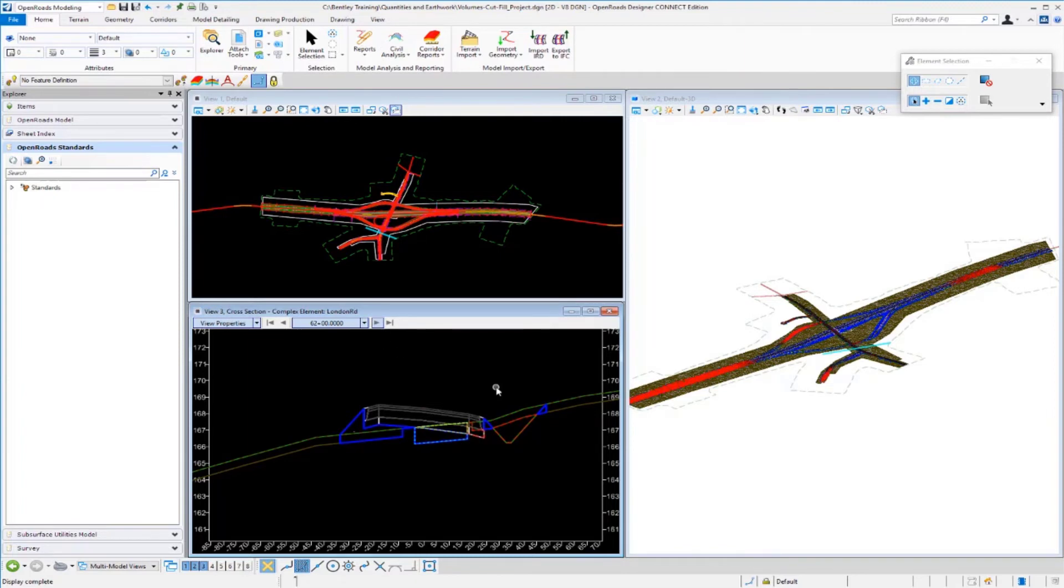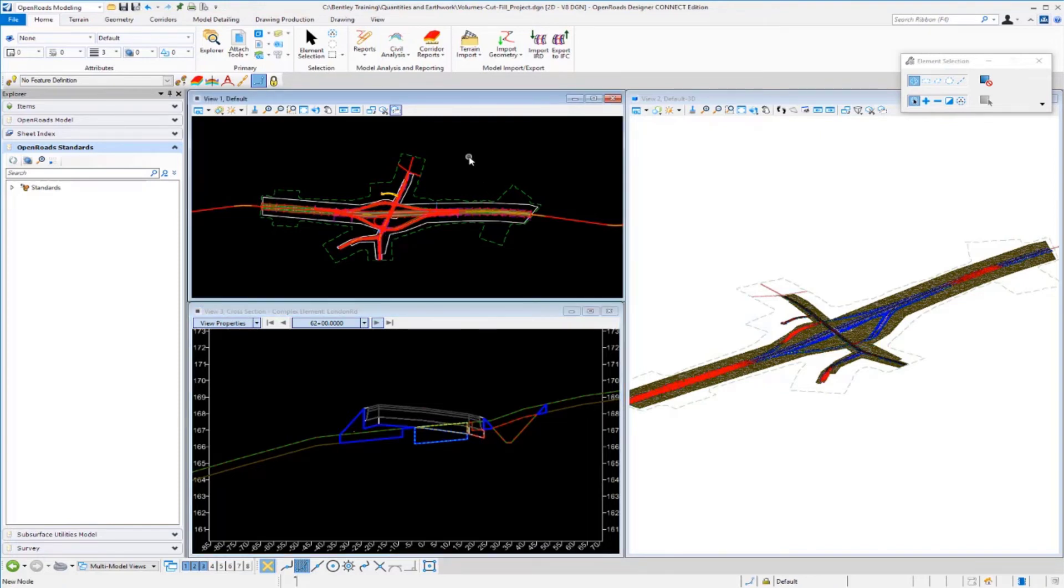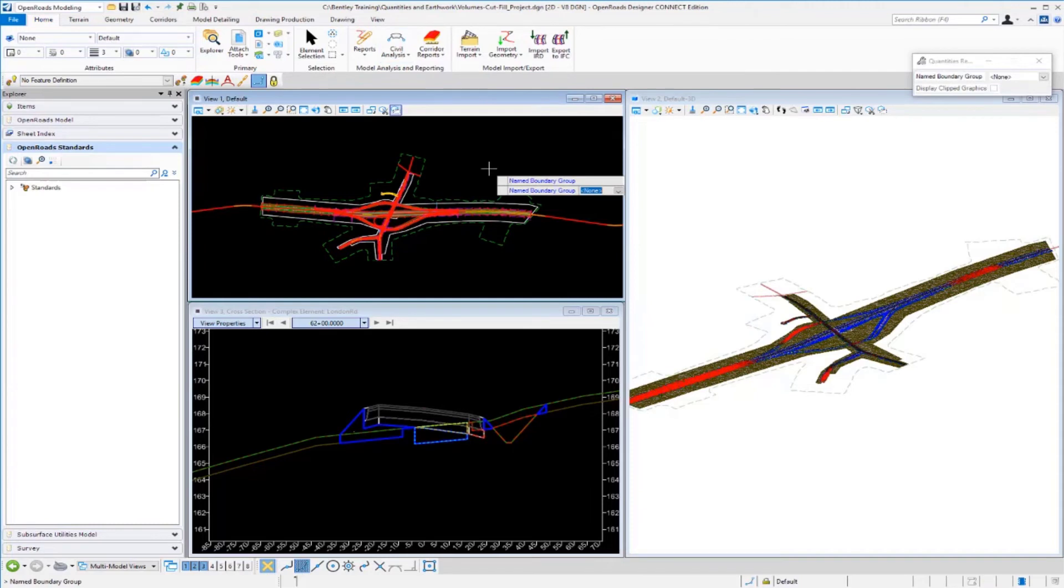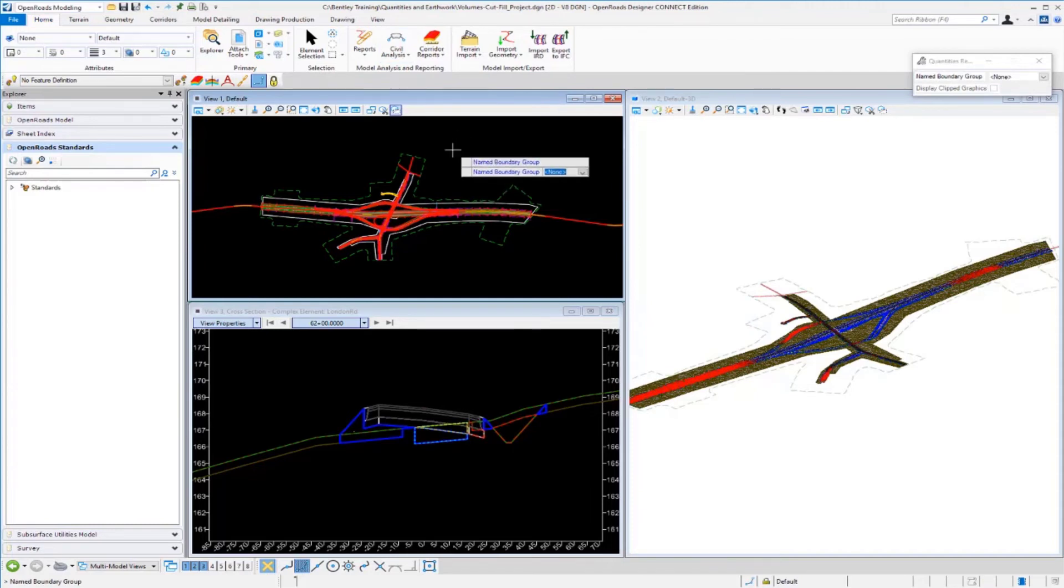It's very easy to generate quantities for the total project. Now if we want to view the report, once again we'll go up to Civil Analysis, we'll go down to Quantities Report by Name Boundary. We're not using name boundaries at this time so we just want to get the total quantities that we see in the 3D model. And we're just going to left click to accept.